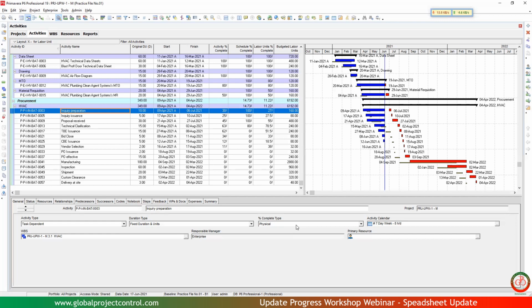You should derive the percentage based on the measurement system. I emphasize that. If you calculate the progress based on the hours in your system, you're right. Some projects may have a different rule of credit. All of them should calculate the progress based on their own rule of credit.